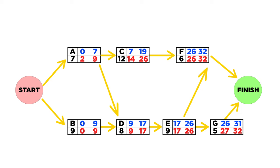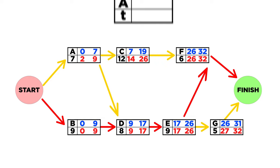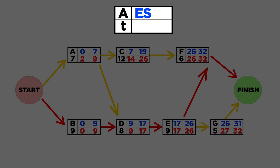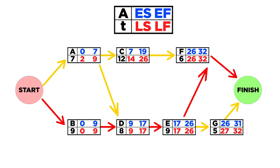Once you have determined how the activities are interconnected and depend on each other, you can make a diagram showing the critical path analysis chart and use arrows to connect the activities. Estimate how much time each activity will take — for smaller projects you can estimate in days, and for bigger projects, in weeks. The last and most important step is to find the critical path. First, you need to determine the following parameters: Early Start — the earliest time to start working on the project; Early Finish — the earliest time to finish the project; Late Finish — the latest time to finish the project without delays; Late Start — the latest time to start the project without delaying it. After determining the time parameters, do the forward and backward passes to determine the project duration and the critical path. The critical path is the longest path with the shortest duration to a successfully finished project, which means any delay on any critical task will delay the entire project. Critical activities cannot afford any slack time.